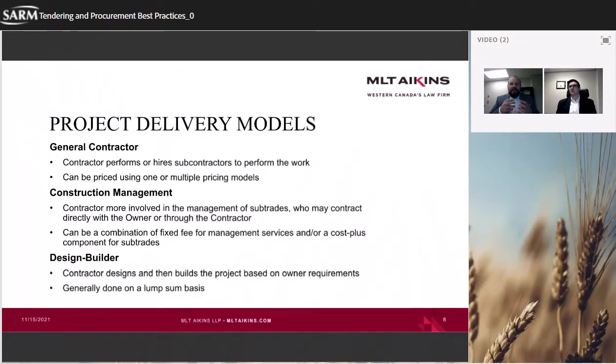I would say if the trade agreements require it to be a public tender, then you have to allow the open sourcing of the bids, and you can't just pick your 3 favorites, whether they be your neighbors or they've done a great job for you last time. You have to allow the public to provide pricing in compliance with the trade agreement. So yeah, those would probably be more used by small projects below thresholds, or in the alternative, more for private industry than public entities.